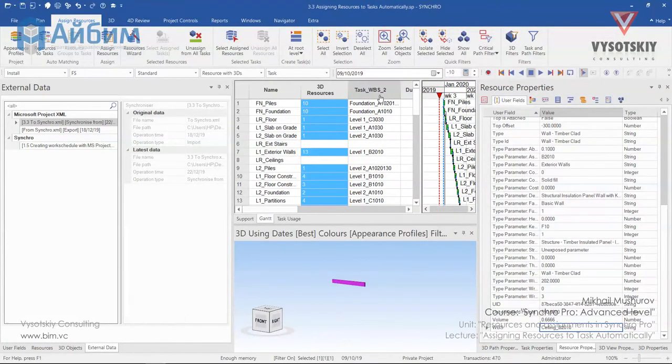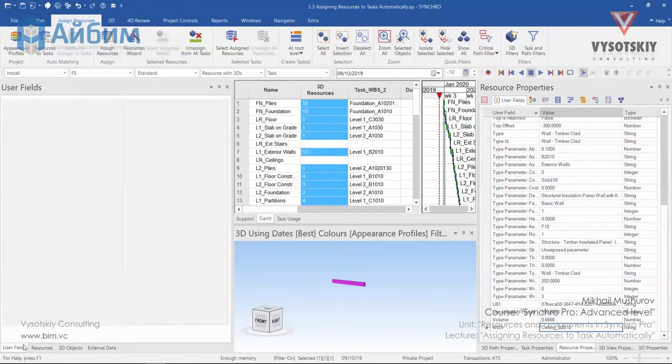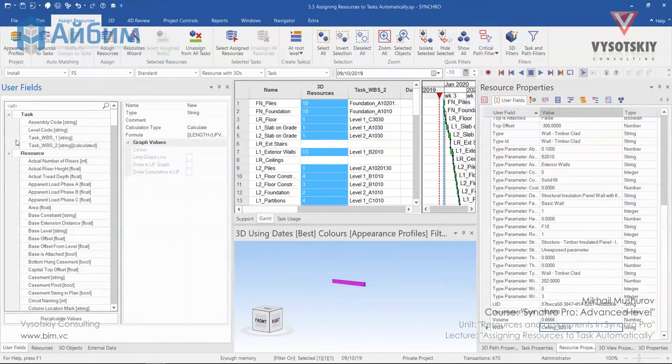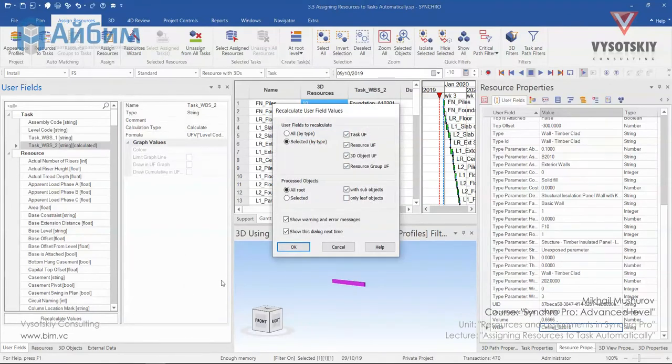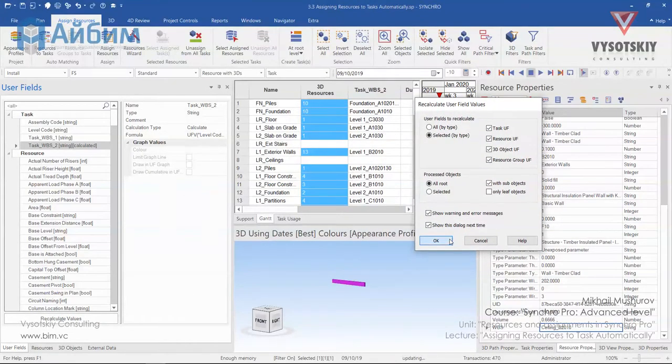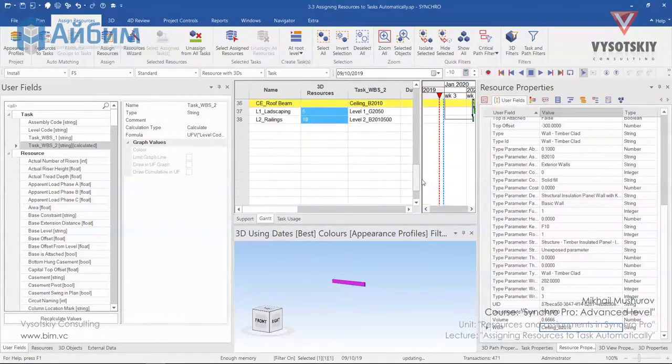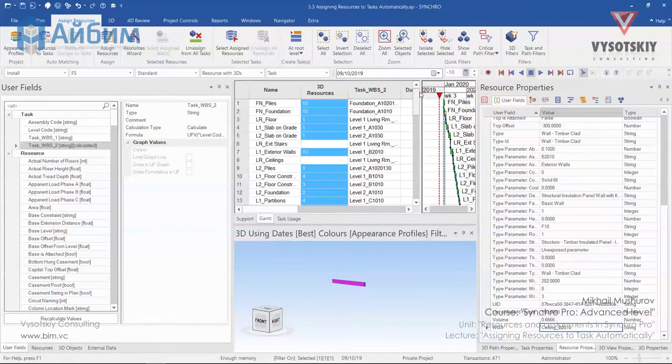Now we need to recalculate our task VBS2 value. Go to the User fields. And choose Recalculate Values. And OK. So all VBS values have been established automatically for all tasks.